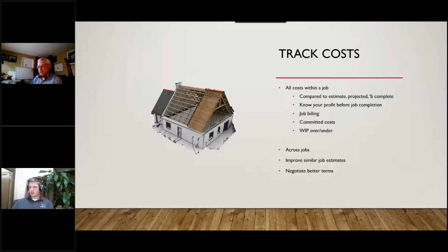If they add up to being material and there's lots and lots of little items going into it, lump it into something and do an estimate overall and allocate it. If they're material and they're in bigger chunks, you might really consider tracking them, especially if you're concerned with profitability and losing points in profitability. So it helps you know your profit before job completion. The worst thing to do is to find out at the end of the job you were half the profit that you thought you were going to be, or worse yet, at a loss.